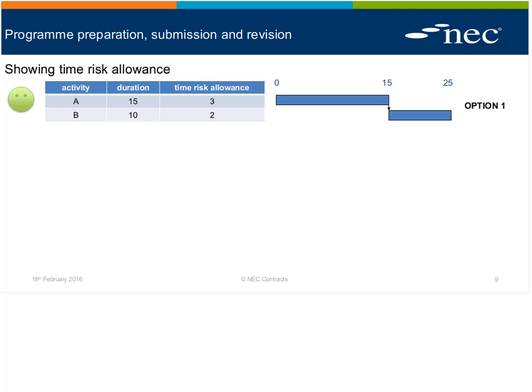It's the context within which you're working, whether environmental or time pressures. If there's a key date looming, then perhaps the time risk allowance could justifiably be greater. I usually call it sunny day rates: the difference between sunny day rates and the most likely. Blue sky and reality. So, dig a hole in the middle of summer with the sun shining, but not too hot, versus the deepest, darkest winter.